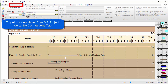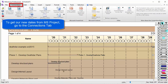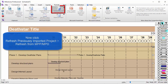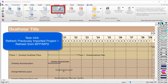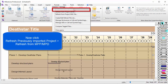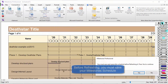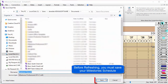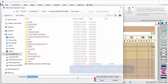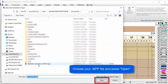To update dates, go to the Connections tab and click Refresh Previously Imported Project. Choose Refresh from MPP/MPD File — or if you're refreshing from Project Server, choose that option. It will prompt you to save your schedule, then you can pick your MPP file. I've got that same MPP file already open in Project, so I'll select it and click Open.